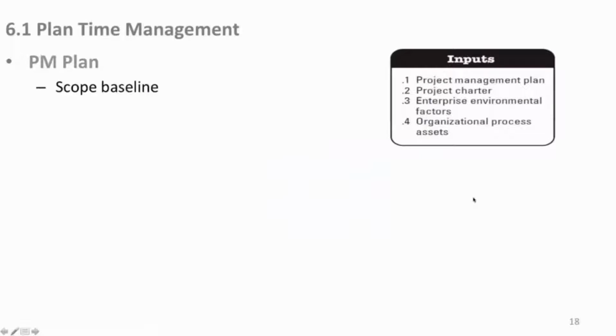So the project management plan, primarily your scope baseline, of course. This is your marching orders, because under the scope baseline, you have your scope statement, the official project scope statement of the scope you're going to build. It has your work breakdown structure of all the items that make up your deliverables, and the work breakdown structure dictionary, which says here's how you're going to build those particular pieces, and the time and the cost and the duration to do that.